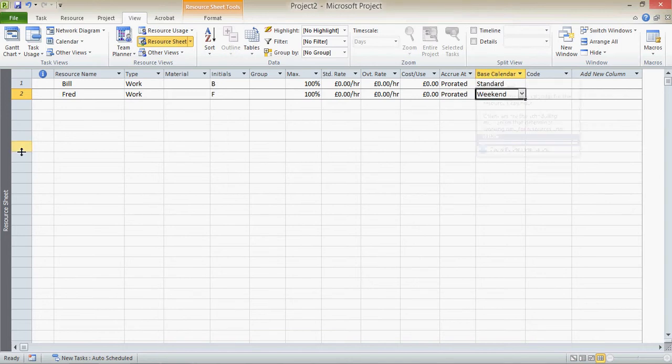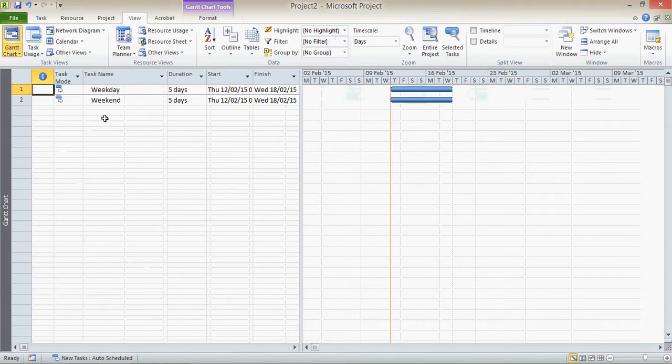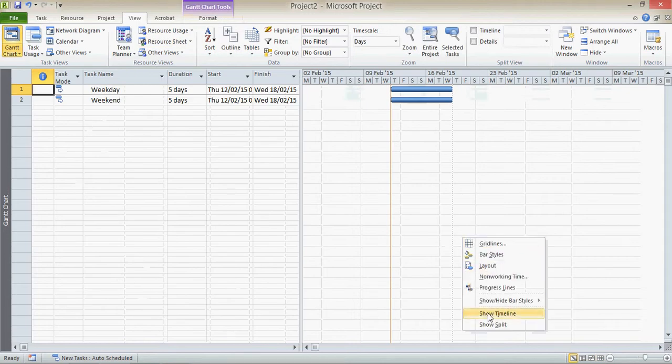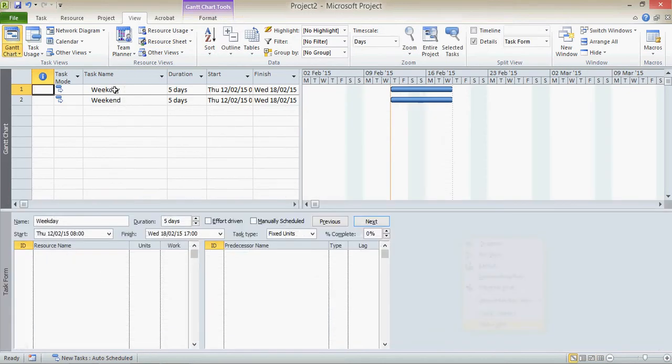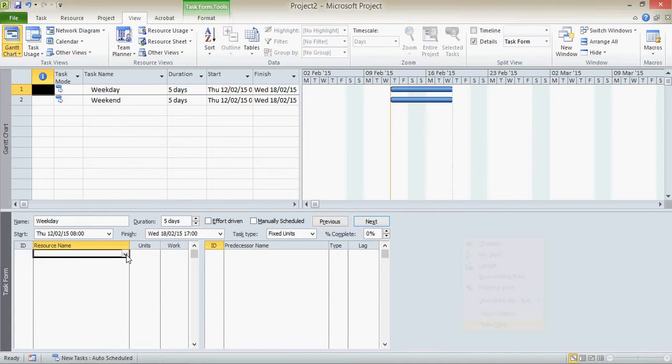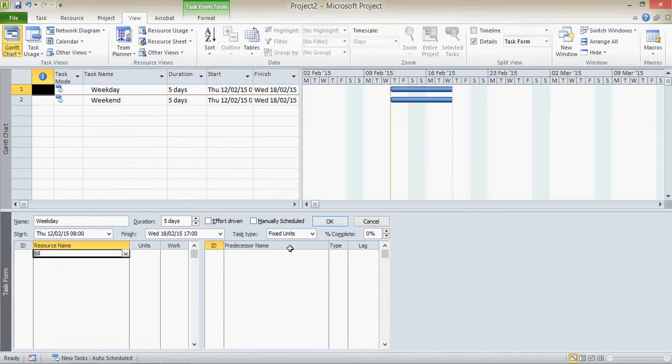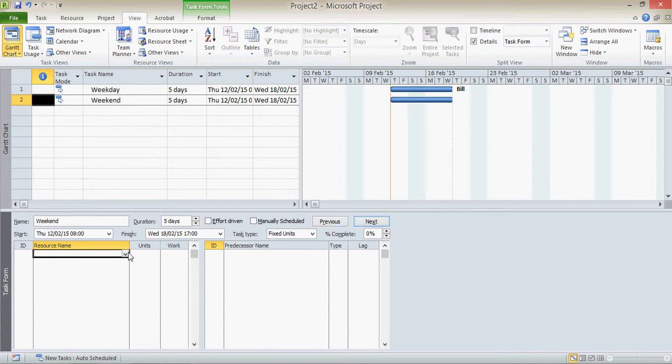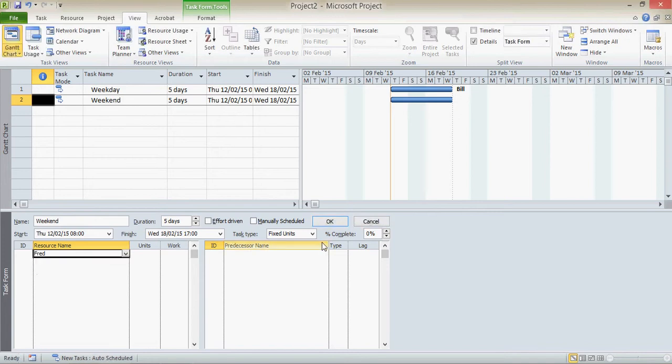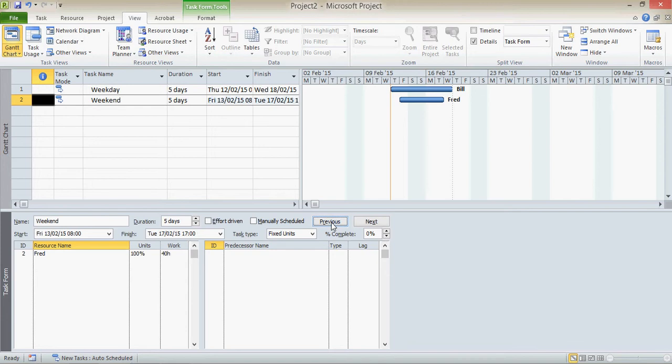So let's see how that works. I'm going to go back to the Gantt chart and I'm just going to split my screen here so we can actually assign these resources. So I'm on weekday and I'm going to assign Bill. Click OK. Next. I'm now going to assign Fred. Watch what happens to the Gantt chart now when I assign Fred. That task is seemingly shorter. It's not actually shorter. It's still five days. The difference is now two days of the work is carried out over the weekend.